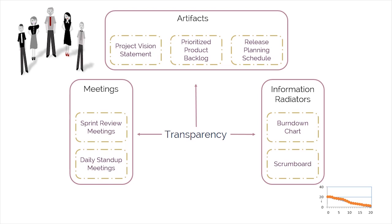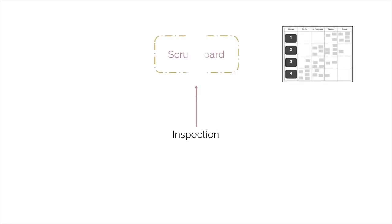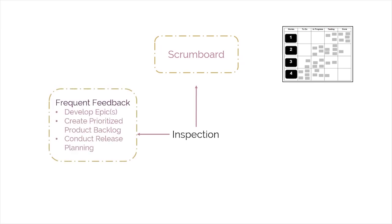The next characteristic of Empirical Process Control is inspection. Scrum provides a point of inspection with the use of a common Scrum board and other information radiators, which show the progress of the Scrum team on completing the tasks in the current sprint. The collection of feedback from the customer and other stakeholders during the Develop Epics, Create Prioritized Product Backlog, and Conduct Release Planning processes give additional opportunities for inspection.